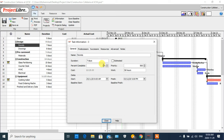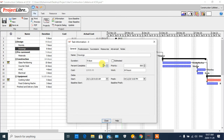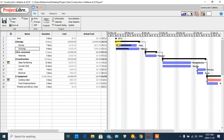If I double-click on each task — for example 'Permits' — we have the 'Percent Complete' field. I can define that up to now 60% of this task is completed. Also for 'Drawing,' maybe 40% of that task is completed up to now. As you can see, we have a black line over the blue bar of the Gantt chart that shows the partially completed task.